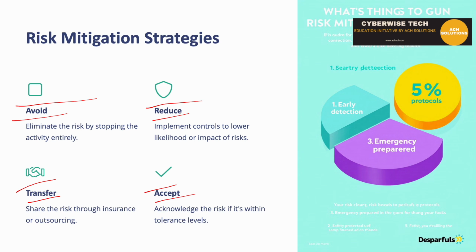So in those cases, when you find that risk mitigation will take a complete overhaul of the factory, the complete infrastructure to be changed, but even if the risk is realized, the loss will happen, but it is not equal to the amount of investment that you need to make to cover up the risk mitigation. So when the cost of risk mitigation is higher than the impact of the risk itself, generally the company says okay, let's accept the risk, because the remediation is costlier than the impact.